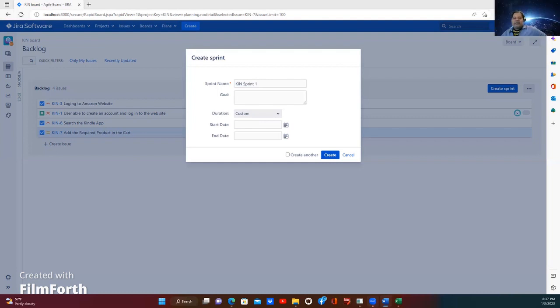What is the Agile sprint? The time box where everyone works within that sprint, 2 to 4 weeks, to accomplish their user stories, whatever user stories have been chosen for that sprint. For example, there are 100 user stories, but maybe the team chooses 5 of them to work on in sprint 1, which is a 2 week time frame. And then they'll create another sprint 2, where they'll choose maybe another 7 of the user stories to work on. That is called a sprint.